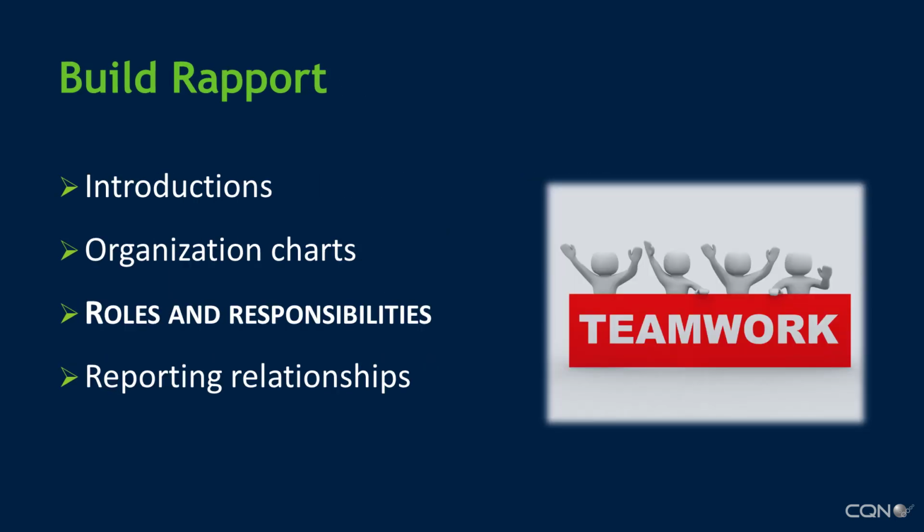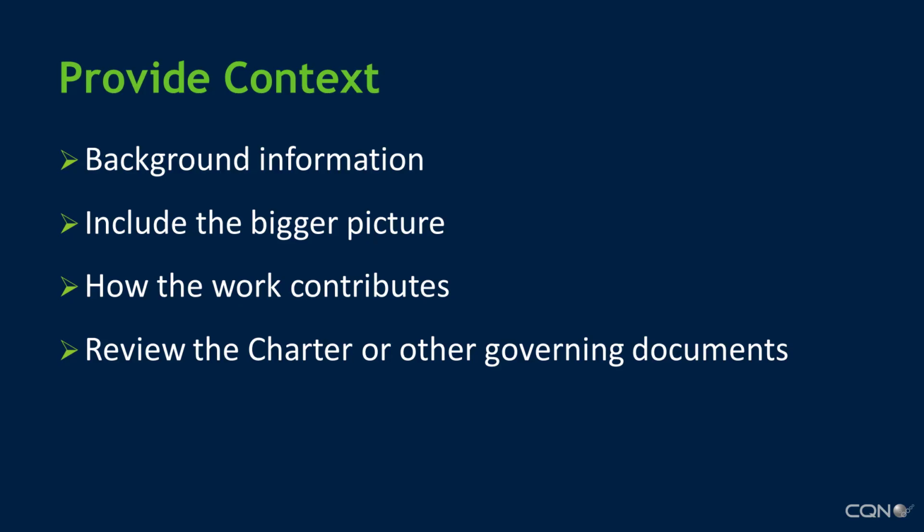Build rapport. Start with introductions so that people can put names to faces and job titles. Reviewing respective client and contractor organization charts and reporting relationships is helpful. A high-level description of individual responsibilities is also valuable. Follow with background information that gives the teams an understanding of the importance of their efforts and contributions to the project. If there's a project charter, it's time to review its key elements.